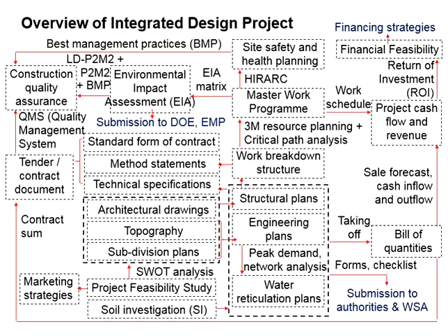Based on the amount of the capital investment, compare against the profit made from this project, you can now compute the return of investment in order to decide whether the relevant investment is worth it, at the same time taking into the considerations of the potential risks for the project. And then this is about the financial feasibility.